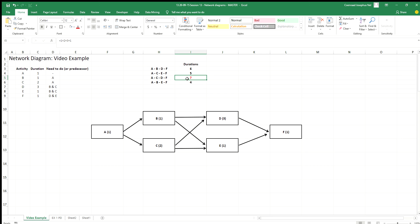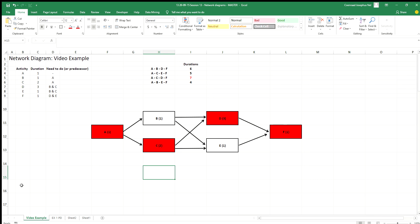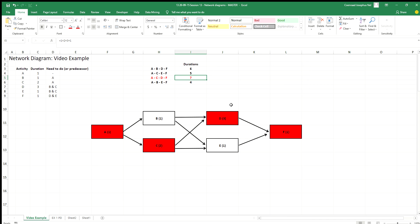You can see the longest path is 7, and all the rest are smaller than 7. So my critical path through this project is A, C, D, and F. Those are my critical activities. My total duration for this project is 7 — whether that's days, weeks, or months, depending on the units used. That's a simple example of how to set up and work through a network diagram to find: number one, the flow of activities; number two, the critical activities and critical path; and number three, the total duration of the project.